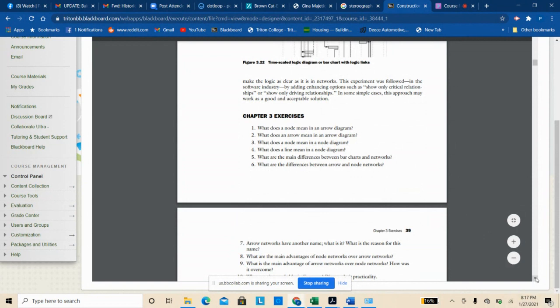When you get into scheduling, you often run into lots of different paths. Your end goal might be an energized transformer, but you might have 3 different teams of people: a relay and protection team, a concrete guy setting the pad and doing all that stuff, and the electricians running the conduits. So you might have a schedule with lots of different tasks, lots of different teams working on different tasks or the same task. And all we're trying to do is to be able to logically think in our heads, how do all those situations relate?